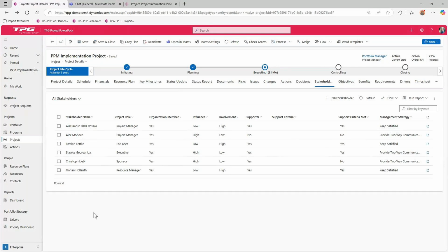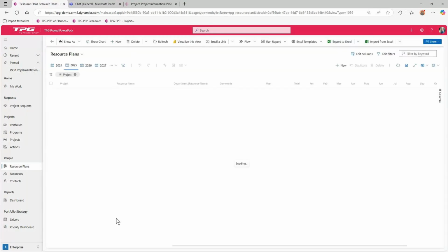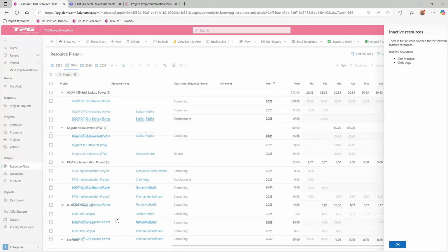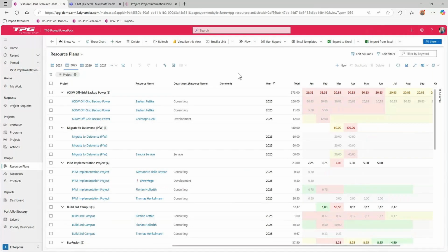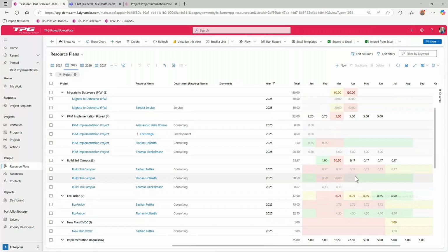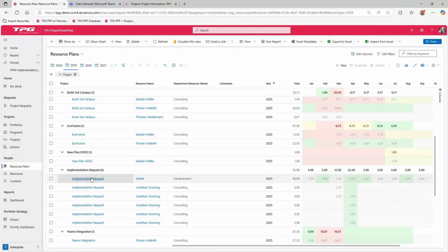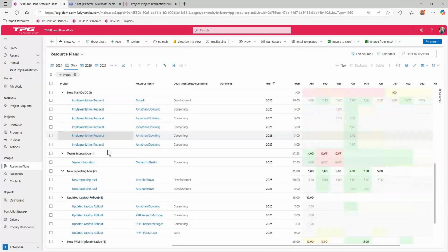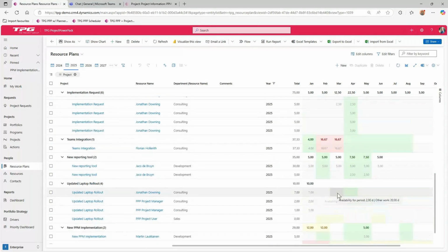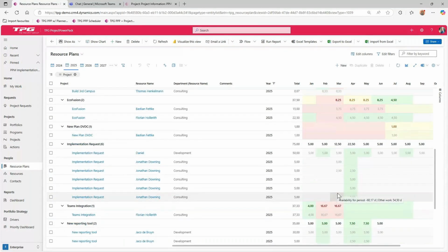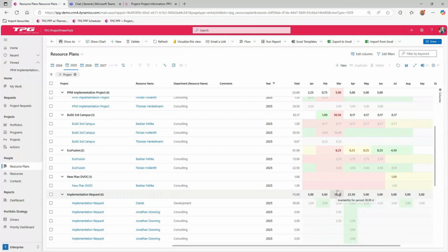Now, if you're a resource manager, for example, let's look at our resource plans. This resource plan view is actually summarizing all of the data from the plans and also what people are expecting to happen from the schedule. So we can start to see by project in this case, and we can look at it in different ways. I've just chosen project on this occasion. We can see where we've got availability or where we've got overloads because of what people think is going to happen or isn't going to happen as well.